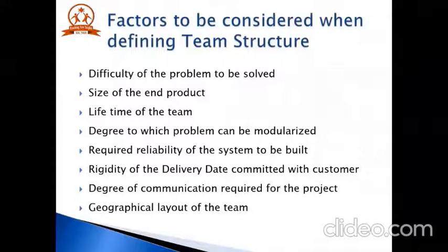Now let's see the factors to be considered when defining team structure. The first and foremost factor is the difficulty of the problem to be solved through the software. Secondly comes the size of the end product which will be developed. Then the lifetime of the team, that is the time when the team has to be together. The degree to which the problem can be modularized. The required reliability of the software to be built. The rigidity of the delivery date committed with the customer. The degree of communication required for the project, and finally, the geographical layout of the team.